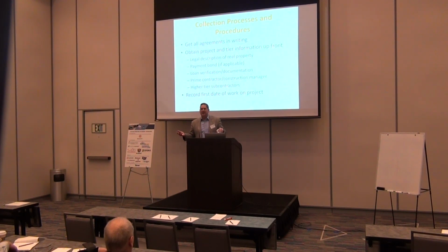If you're 80 to 90% done, and for whatever reason they terminate you and hire somebody else to finish it, you're not out as much. And so maybe there you're willing to walk away from that. So sometimes I've seen where they say, if you get terminated early, you have a bigger penalty. If you get terminated later, it's a lesser penalty. Because I guess owners like having that right, and contractors probably do too. They want that right to be able to replace somebody for whatever reason.